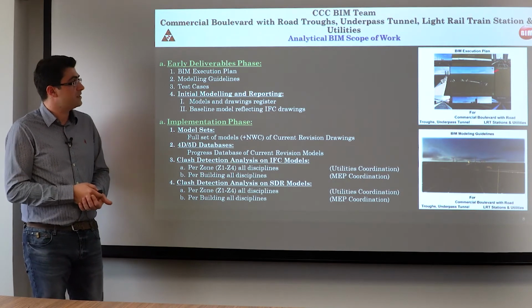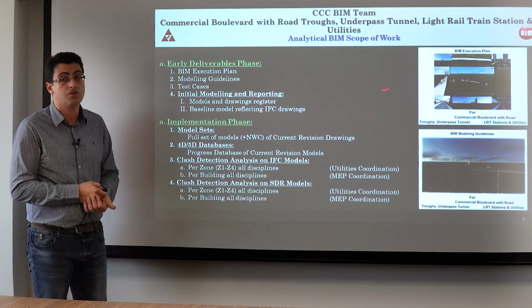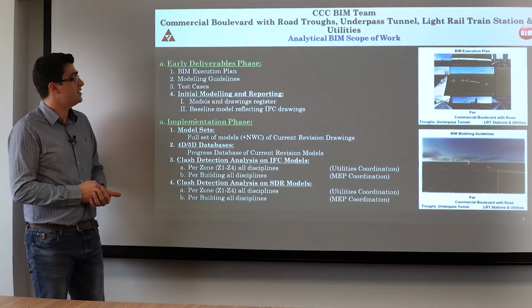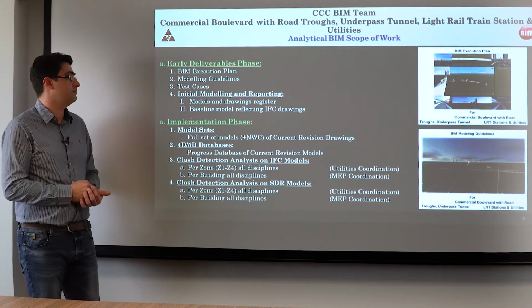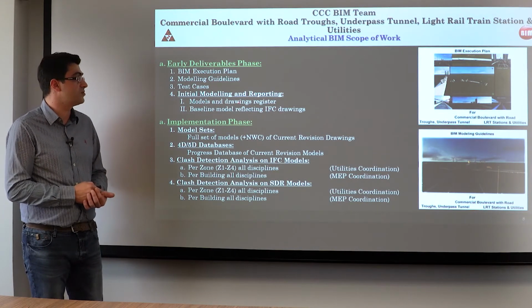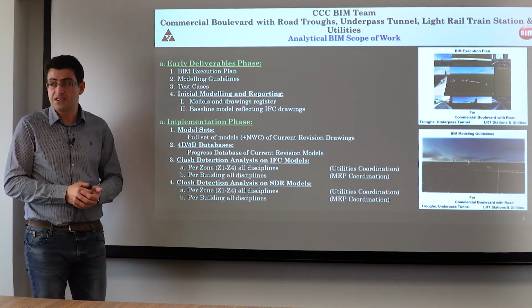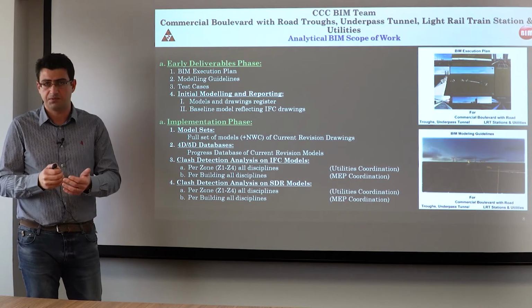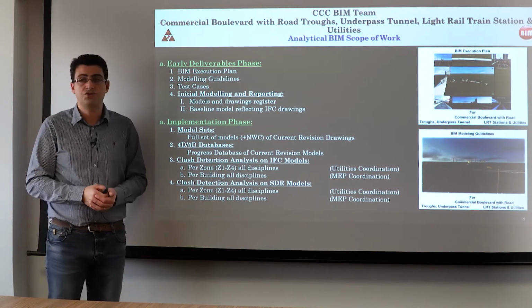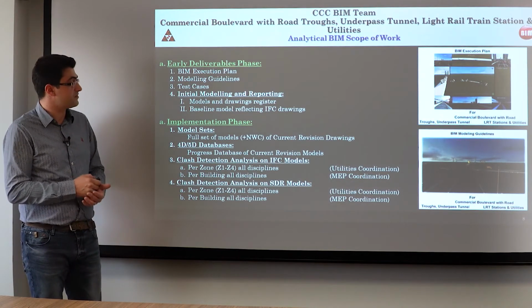So apart from the documents that defined the processes, we had to do some test cases to see that they are working. These test cases were for the initial modeling and reporting of such elements as a drawings register and the baseline model, which will be frozen and considered the first revision, the zero revision in better terms, for the issued for construction drawings. This was the early deliverables phase.